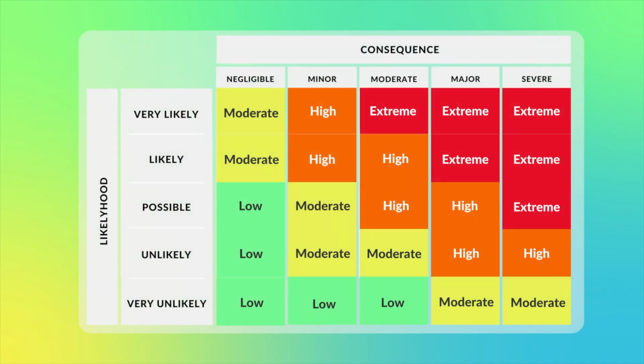A common pitfall for many projects is when risks cannot be quantified and they all get treated the same. Because risks are ever present and the project accepted a certain amount of risk as part of the investment approval in the first place, the project team could drown in immaterial risks and what-ifs without knowing which one of these risks really matter. The best way to assess risks is to have a risk matrix that uses two dimensions of likelihood and consequence. A typical matrix uses a 5x5 grid to assess risk.